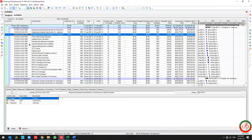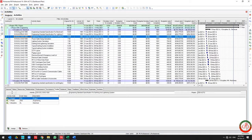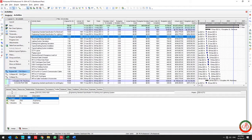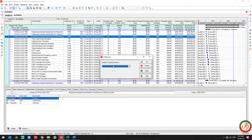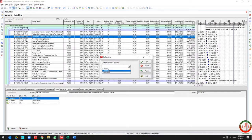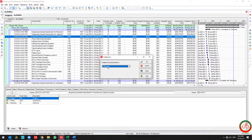Then you have, in the collapse view, instead of level one, two, three, you have the project, phase, and discipline.